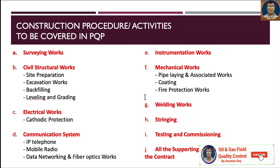Construction procedures and activities generally accompanied with a project quality plan include: surveying work; civil and structural work such as site preparation, excavation, backfilling, leveling, and grading; electrical work like cathodic protection; communication systems including IP telephone, mobile radio, data networking, and fiber optic work; instrumentation work; mechanical work; welding; stringing; testing and commissioning; and all supporting activities mentioned in the contract.